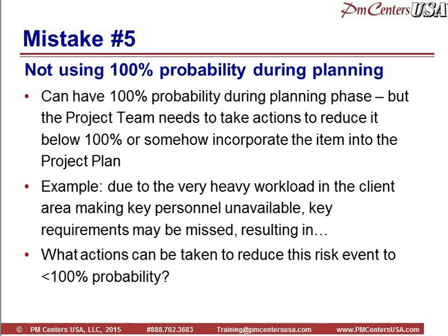I went to the sponsor. There were actually 3 sponsors in executive management. And I told them, look, this is 100% probability. We will fail. So we've got 2 choices. Either we figure out a way to get requirements, or number 2, don't do the project. It's that simple. So obviously, using 100% probability gets attention. It becomes a showstopper, especially if it has a high impact.